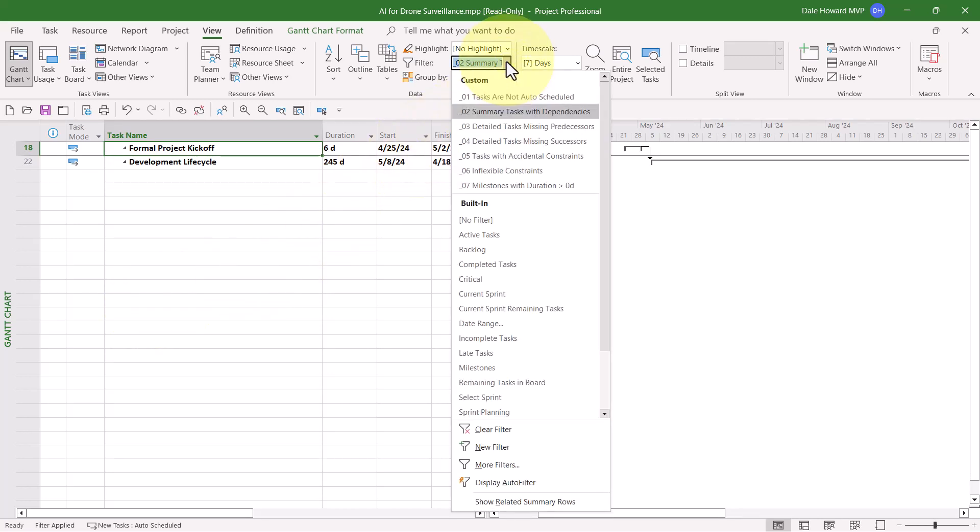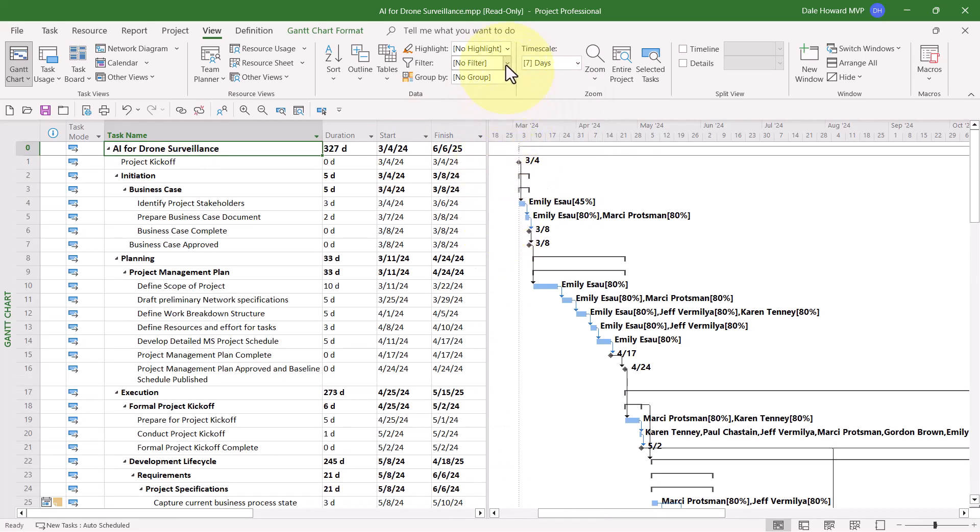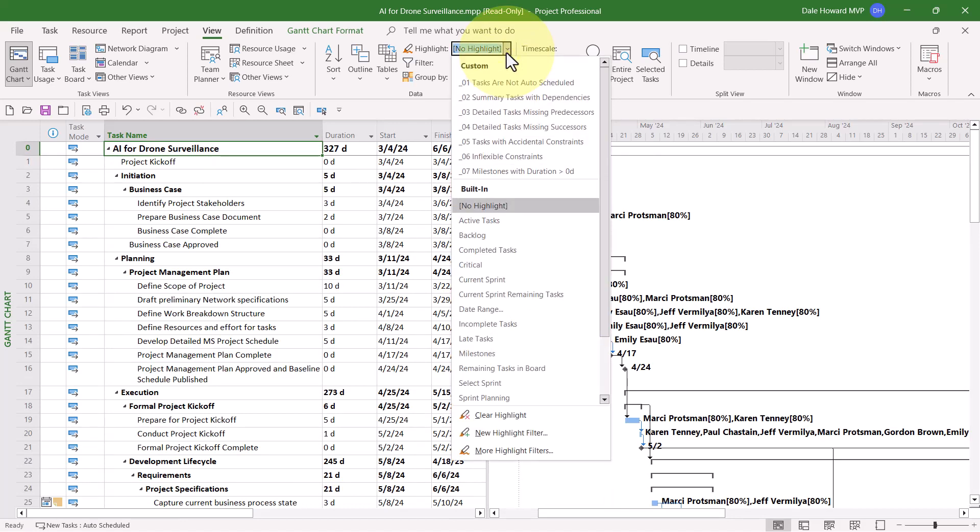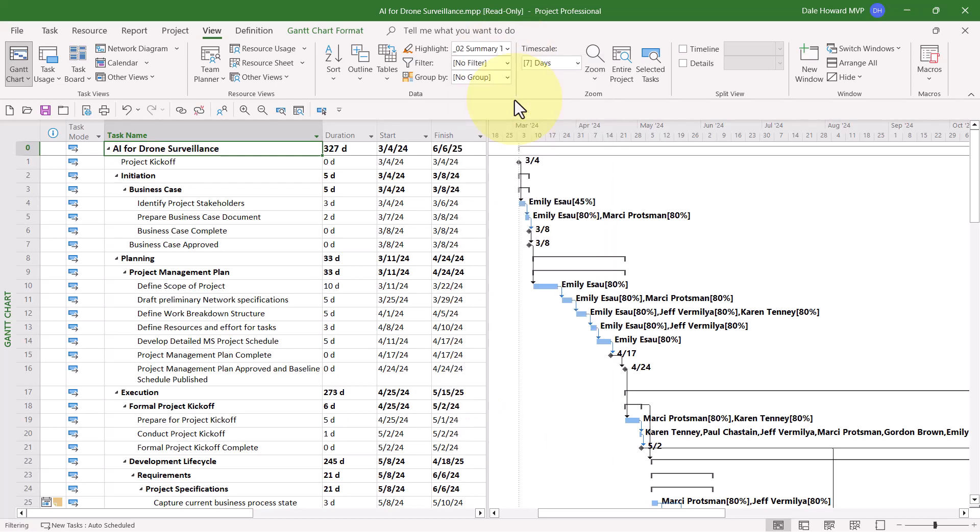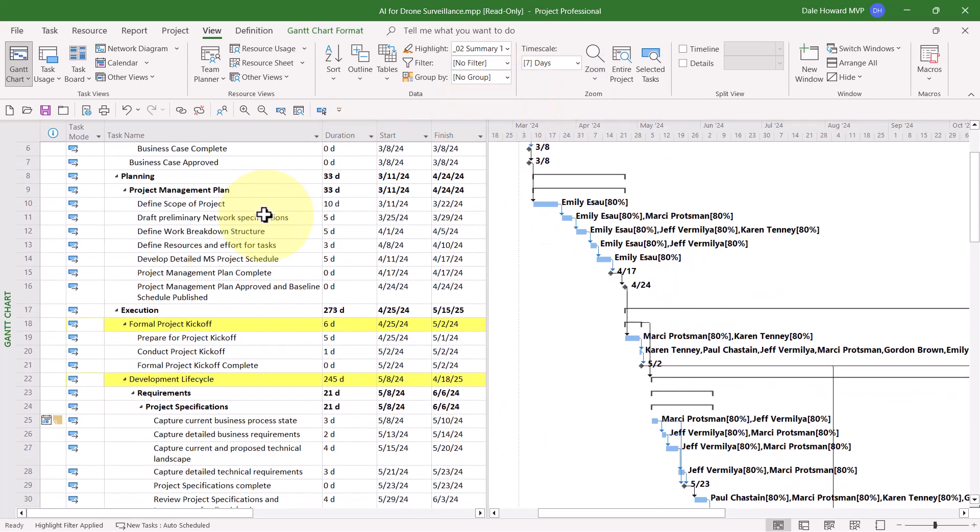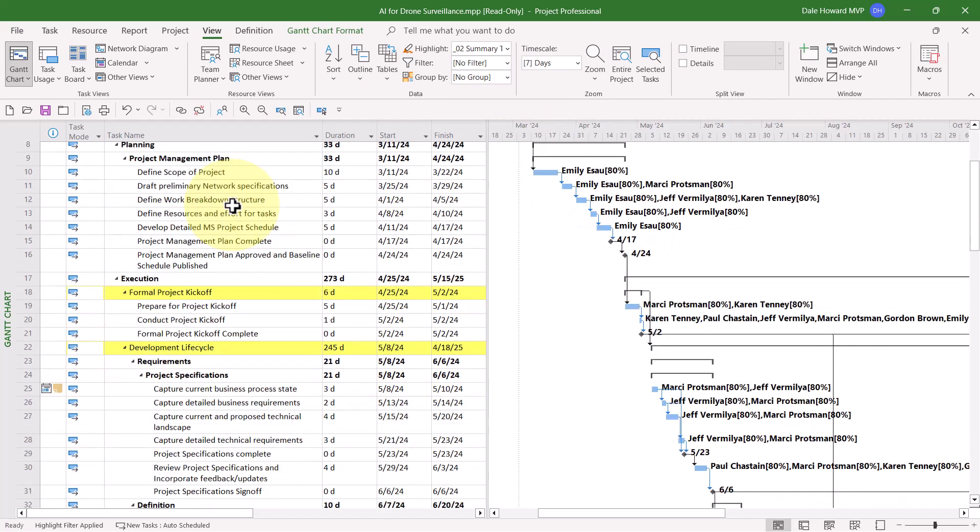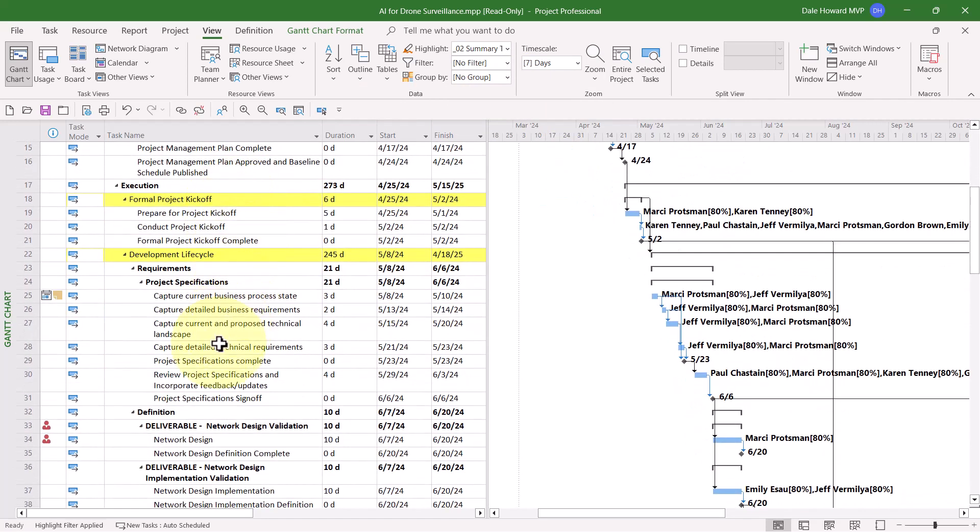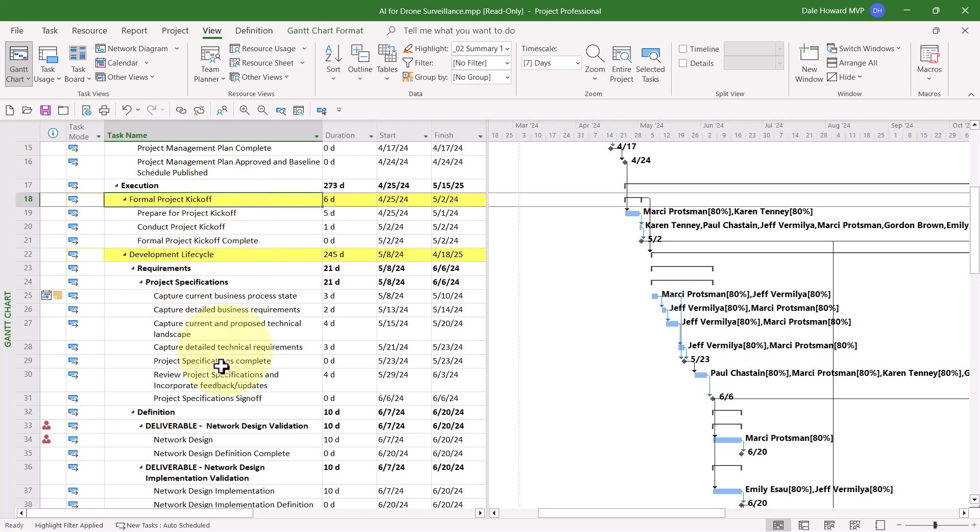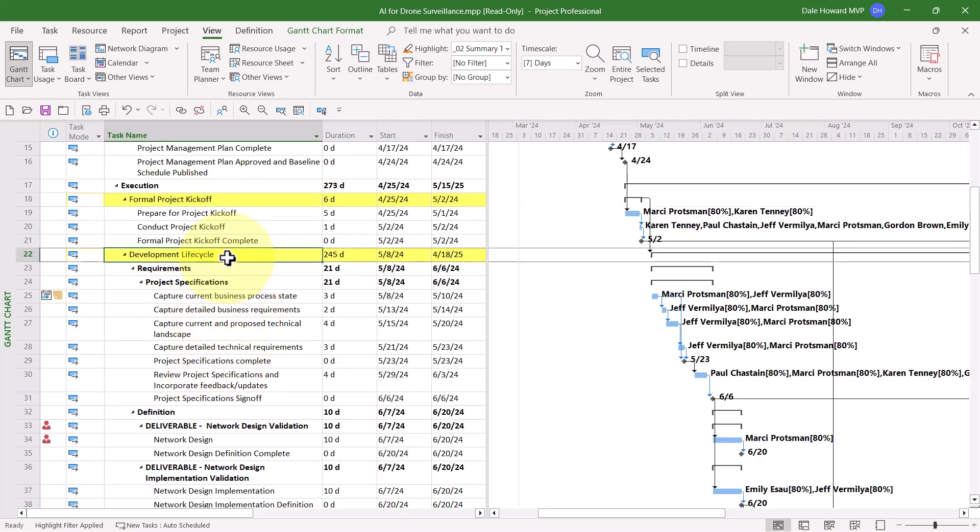Click the Filter Pick List again. Choose No Filter. Then go to the Highlight Filter Pick List and choose the same one, Summary Tasks with Dependencies. This will allow you to see every task in the project, but the problems are highlighted with the yellow cell background color. So I can see task number 18 is currently linked to task number 22, and both of those are summary tasks. Before you unlink them, however, look at the logic of your project to make sure you know which detail tasks or milestones should be linked to other detail tasks or milestones.